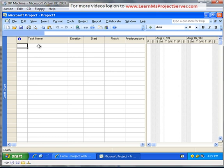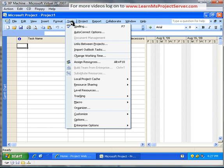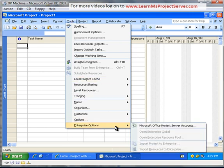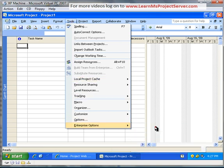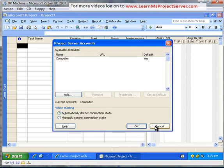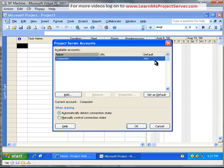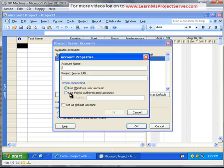To configure Project Professional, let's go to Tools and go to the Enterprise Options and select Microsoft Office Project Server Accounts. By default, you'd have the local login account, that's just the computer, and this is the default profile that works offline. To configure this Project Professional to work with the Project Server, go ahead and hit the Add button.